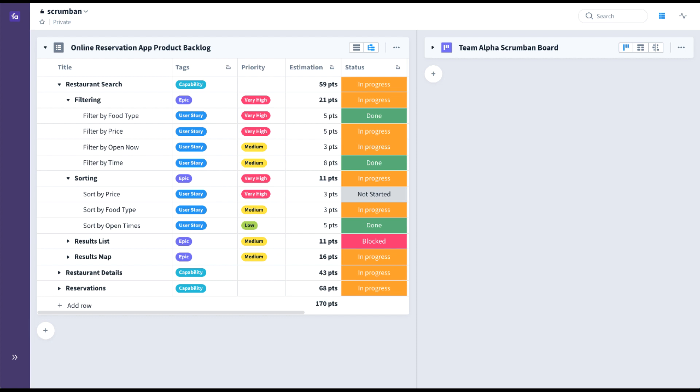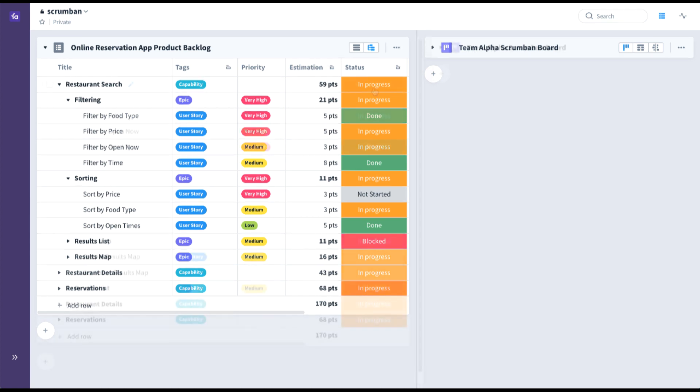As agile teams mature, Scrumban provides the best of both Scrum and Kanban. By evolving to a Scrumban hybrid, they take the time to plan, do, and inspect and adapt by maintaining the Scrum events and roles, while at the same time utilizing Kanban's defined stages, WIP limits, cycle times, lead times, and cumulative flow diagrams to visualize and optimize the flow of value.